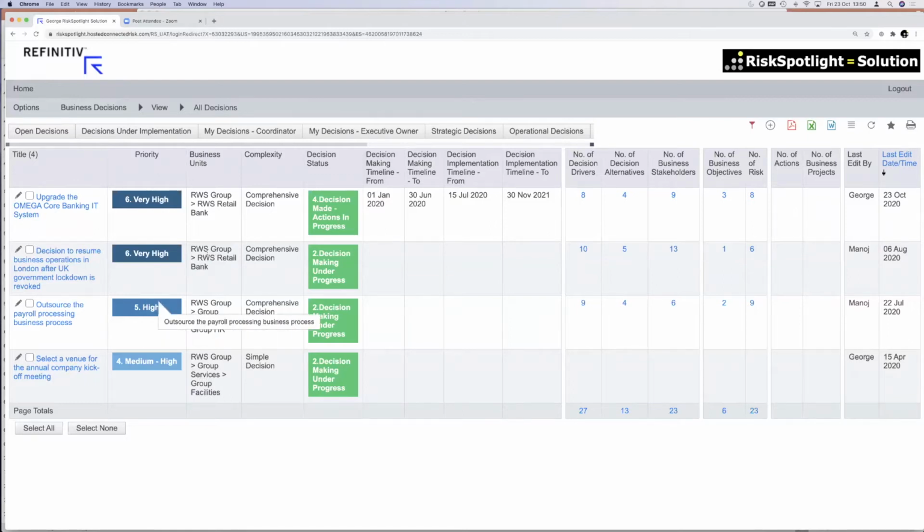So as an organization, you have this repository of all your important decisions, so you can then learn from those decisions. So if you made an outsourcing decision 2 years ago, and then we learned some lessons, next time when I'm making my outsourcing decision, I want to learn from the failures and the weaknesses we had from that previous decision. So by having that repository of decisions, you create an organizational memory, so that when the person who makes the decision goes away, I still have all the thinking in the organization. The thinking has not gone away with that person.